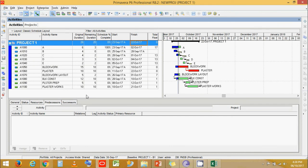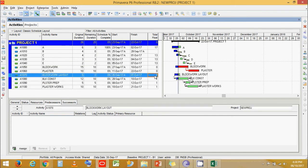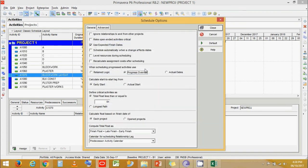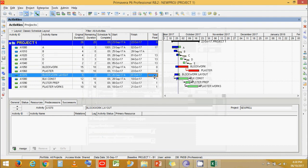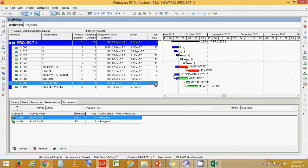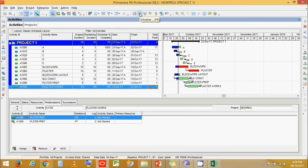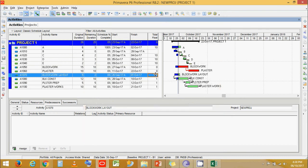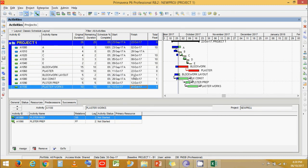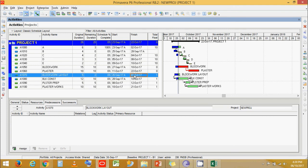In Retain Logic, out-of-sequence activities give a more drastic report showing the project is behind the baseline schedule. When Primavera ignores predecessor relationships it shows a more optimistic project end date. Looking at the set of activities, they each have different total float. In Progress Override, Block Work Layout has seven days of total float while the rest have one day. In Retain Logic, the whole network has one day of total float because Primavera calculates the project end dates based on the predecessor activity which is still in progress and not completed, hence maintaining the project logic.